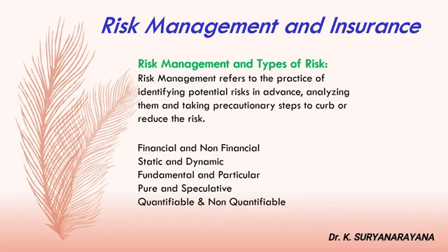Risk management is a dynamic process. Large corporations change frequently. They introduce new products, new services, merge, acquire or sell operations, increase or decrease of capital cost. Each time an organization changes significantly, it should review, and if necessary, they have to update the risk management plan.